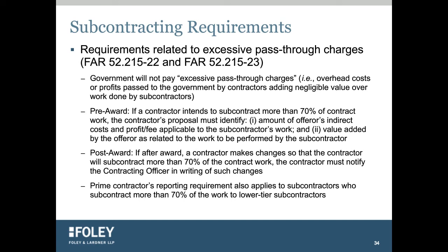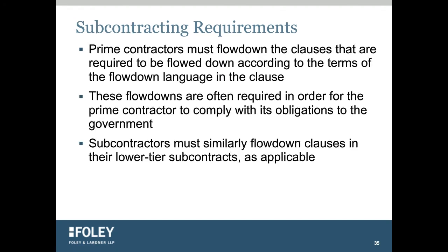Finally, as a prime contractor, you need to make sure you're flowing down the clauses and requirements as necessary. You certainly want to flow down the clauses that you're required to flow down, but you also want to flow down the clauses that you need to flow down in order to comply with your obligations to the government, including your reporting obligations. And if you're a subcontractor, you also have to flow down the clauses that are required for you to comply with your obligations to your higher-tiered contractor.